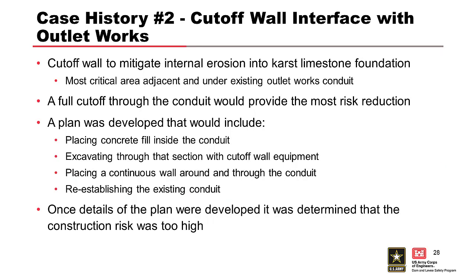The second case history involves Rough River Dam in Kentucky, an existing embankment dam where the project required construction of a cutoff wall to mitigate internal erosion of embankment and foundation soils into a karstic limestone foundation. Most of the cutoff wall could be built with standard hydromill construction techniques excavated in a slurry trench method. Unfortunately, the most critical location with the most open karstic network was directly under and adjacent to the existing concrete outlet works conduit, requiring a continuous cutoff wall that fully penetrates the karstic foundation rock, including underneath the existing conduit.